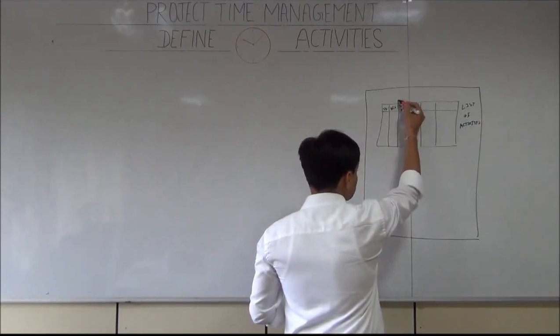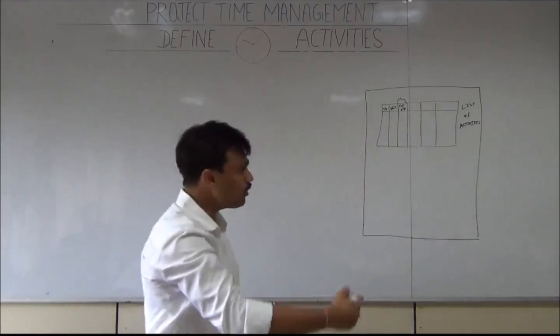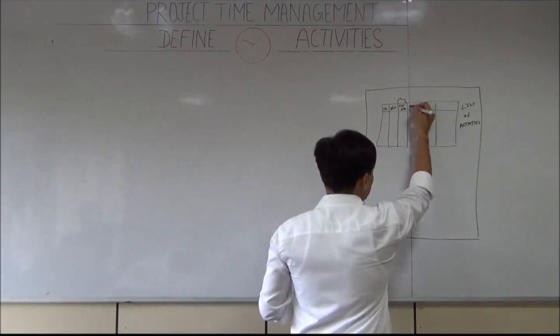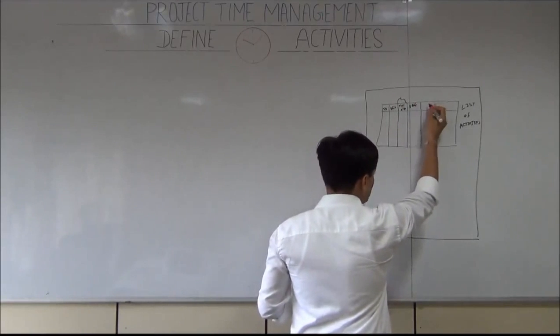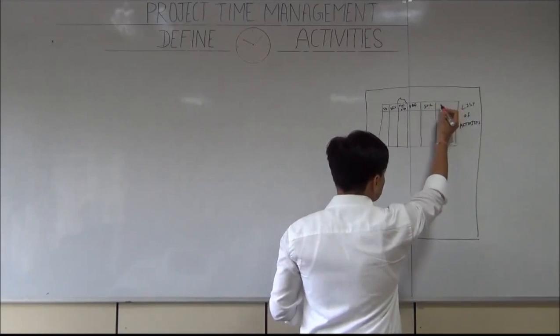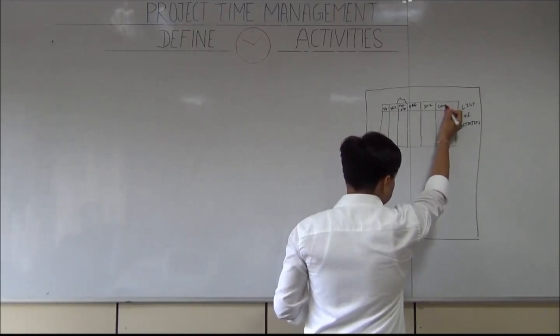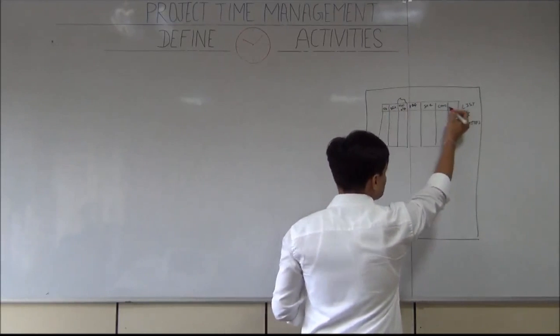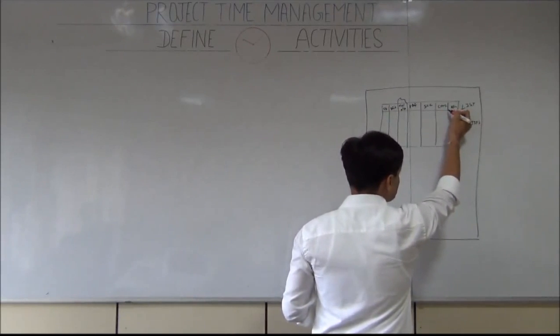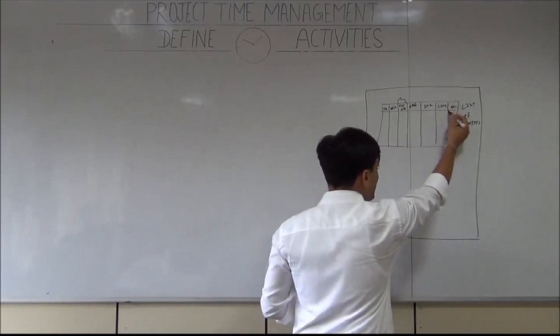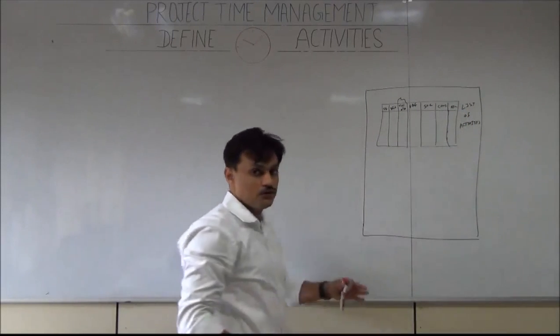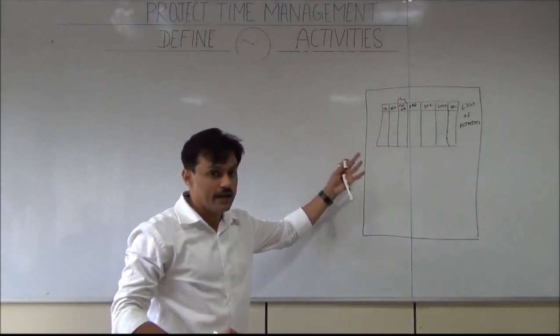Now this type of activity I will talk a bit more about. We can have an attribute which defines a predecessor, we can have an attribute which defines a successor, we can have an attribute which defines any constraint attached to the particular activity, assumptions attached to the activity, etc., etc. So we can have n number of attributes which are associated with a given activity.